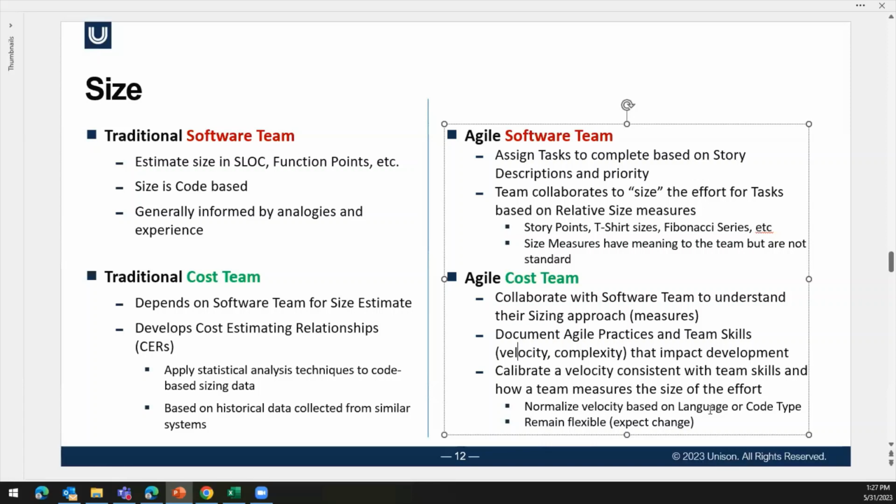but it'll do it based on something as common as the language you're using. So if you're writing in C++, yeah, that's still lines of code. So let's talk about lines of code per hour. There's no problem with that. Now, you may want to call it stories or story points, and in your brain, 50 lines of code is a medium-sized story or something. There has to be a translation key, but that's what the cost people are there to figure out.